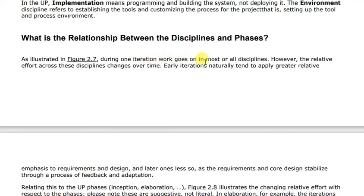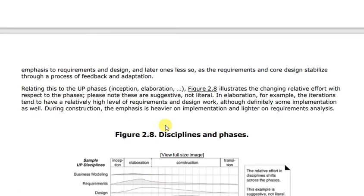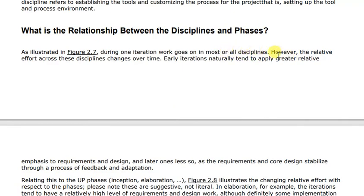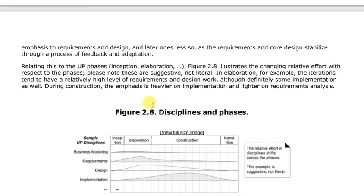During one iteration, work goes on in most or all the disciplines. In every phase they are working on all disciplines. However, the relative effort across disciplines changes over time. Early iterations naturally tend to place greater relative emphasis on requirements and design. Later on, because the requirements and core architecture are stabilized, work shifts to feedback, adaptation, and handling just a few remaining requirements.